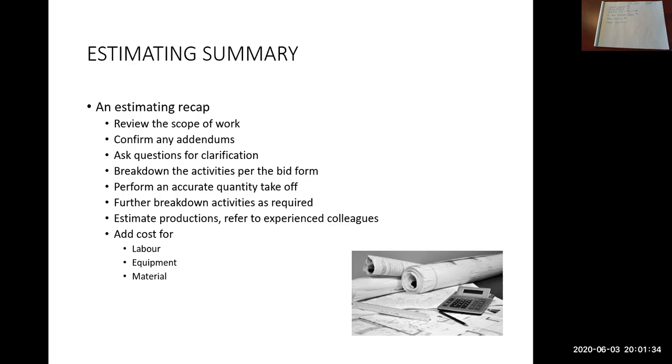You can be told those things. You could be handed a piece of paper that says, you know, a pipe crew has 2 excavators, a grademan, 2 laborers, a compactor, and a 580, and 3 dump trucks. You can be told those things, but I think you retain it better if you see it happening. You see all those different parts and pieces working together to build the project.